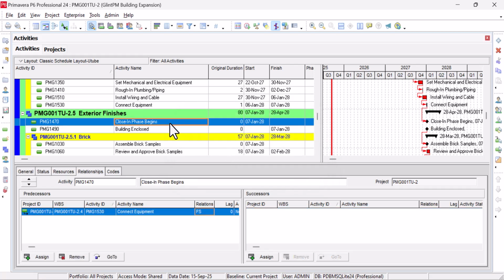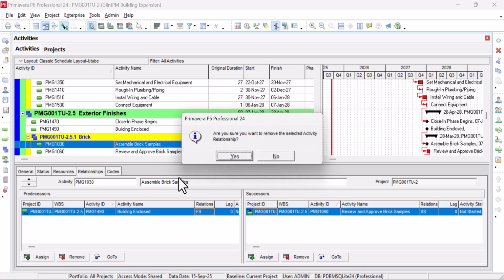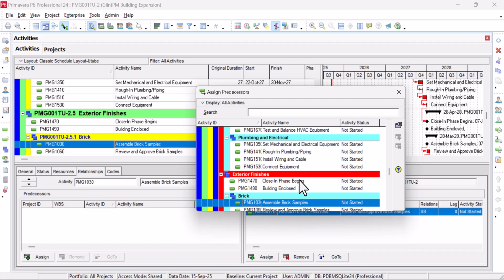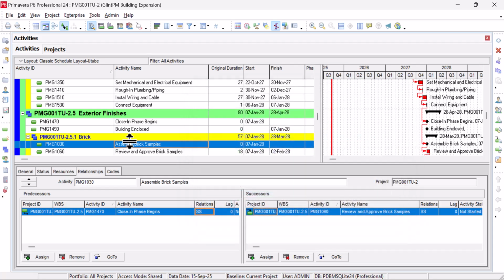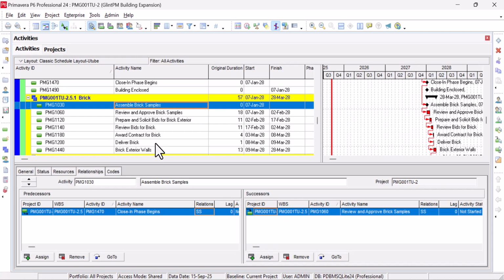Take note, I said a start milestone should be linked to the activity that it is going to drive, while a finish milestone should be linked as a successor to the activity that is driving the milestone. And that's what I'm trying to check here. As you can see, the activities I'm linking to the activity. I always pause to be very sure of the activities I link, and check the other one.